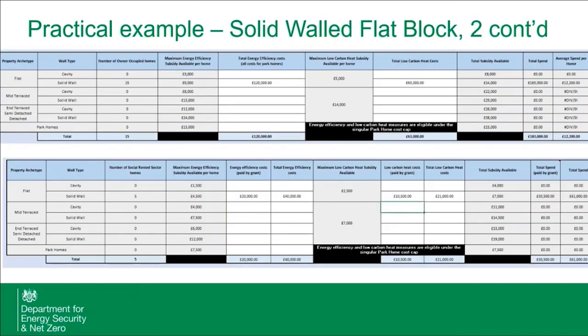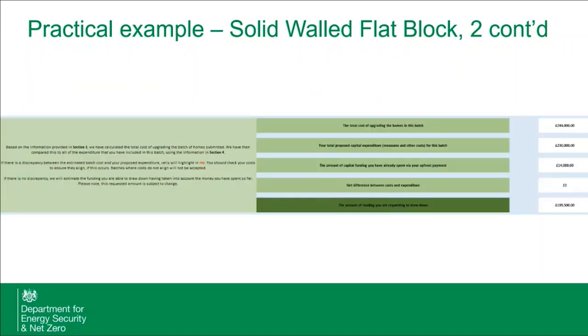I filled this out for both the flats and for both the owner occupier and the social housing landlord costs, with the costs split across that block 3-to-1 for the flat and for the social housing landlord, and then separating out the amount of money, which of course will be 50% for the social houses, for the grant to pay, and the other 50% for the social housing landlord. Costs balance, and so we know that's all fine.